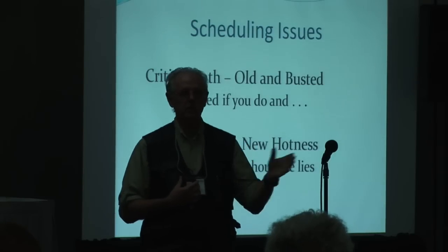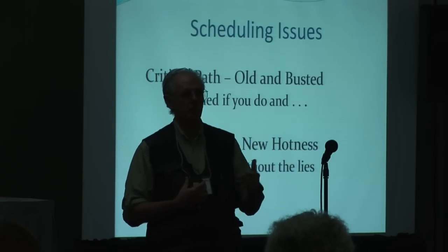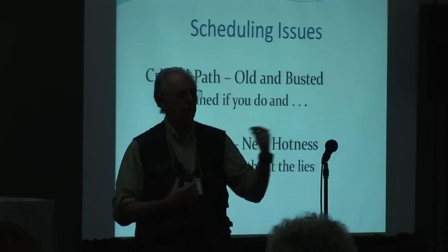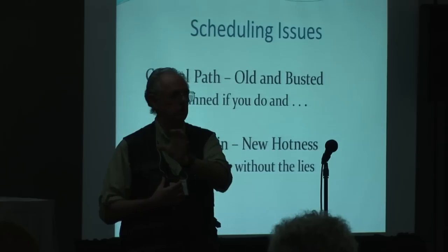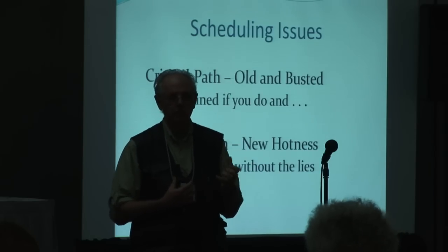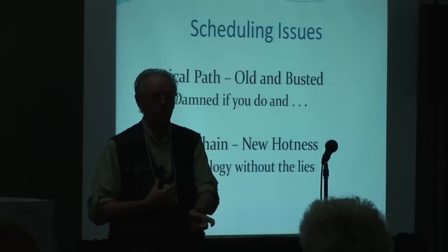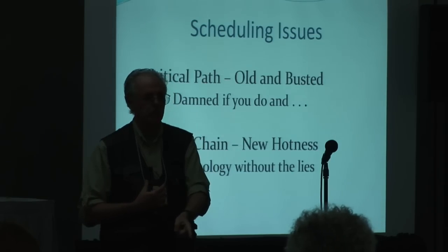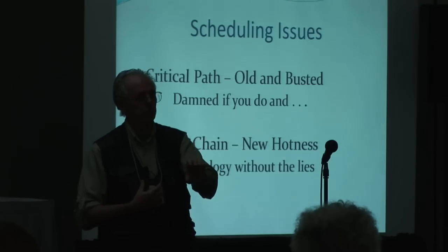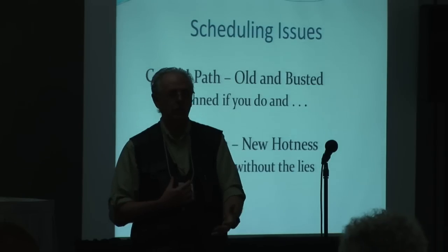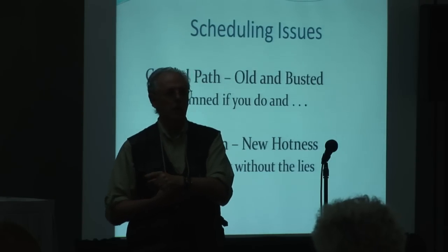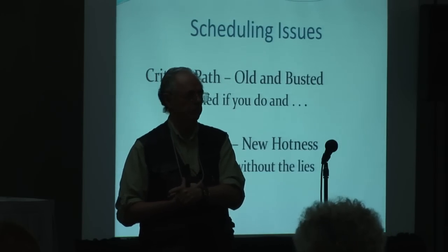In the critical path, really what that says, you've got a series of tasks that are all connected. And some of them can be done in parallel with others, but there's a path through the chain of work that is the minimum time you can get it done based on the estimations for each task. You can't start this one until this one is finished. And when you put them together and get them down to the minimum time, you may have tasks down here that have what's called slack time, because it ends here, but you've got another 3 days before the thing that can't start until this one is done really needs to start, because it's another task up here that won't be done until then. So any task that has slack time in it gets thrown out of the critical path. The critical path gives you the minimum time estimate of how long it's going to take you to get the project done.